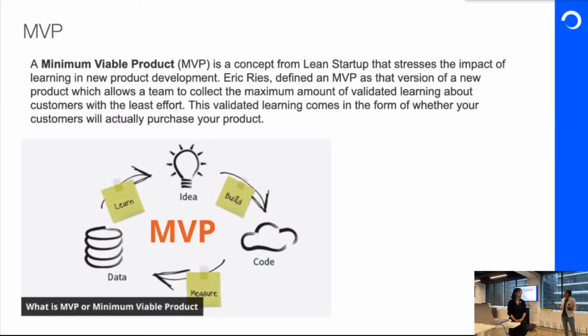Similarly, if you're developing a particular product, let's say you're developing an e-commerce website, what are the bare minimum things that you have to develop so that a person can actually buy stuff from your e-commerce shop, right? Maybe just a home screen with all the products labeled there and directly taking to the cart and do cash on delivery. That's the bare minimum, maybe, right? And these are just conversations.